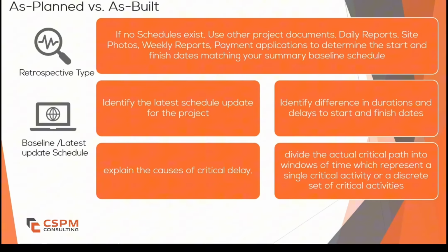As this method relies on the quality of the original plan and the accuracy of records, unlike impacted as planned and TIA, this method is a retrospective type, same as Windows analysis, looking at delay events after they happened.